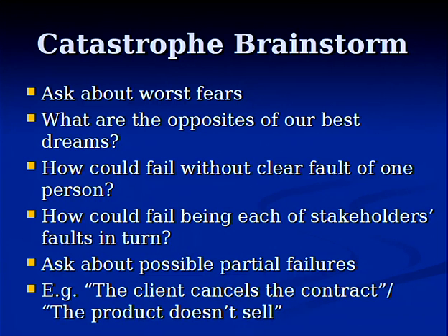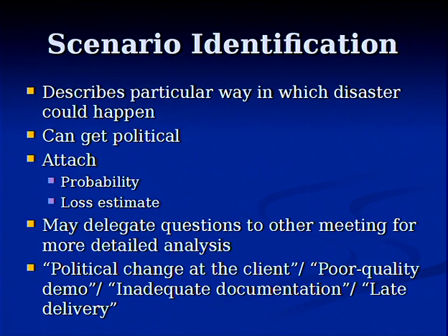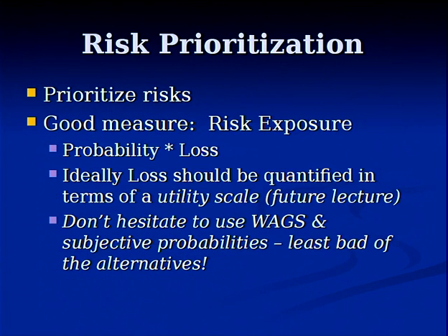It's sometimes recommended to have a catastrophe brainstorming session where you get together as a group and ask, what are the worst fears? Basically, try to uncover risks that people may have in mind. How could it fail, without clear fault of one person? How could it fail by each of the stakeholders' faults in turn? Scenario identification of possible strategies.